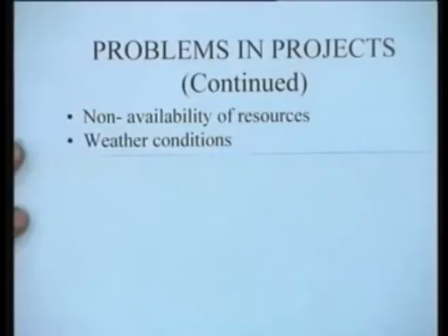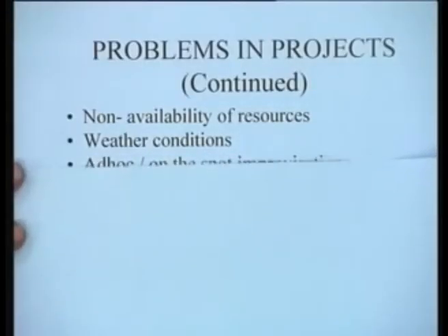So, you have to then take a decision as to what is to be done. You can either decide to airlift it to the near place and then bring it here, which would involve tremendous increase in cost and so on, or think of some other alternatives, or decide to delay the project, as the case may be. So, these are again some of the problems that could be triggered by the weather.